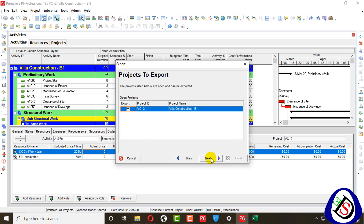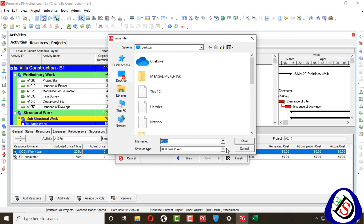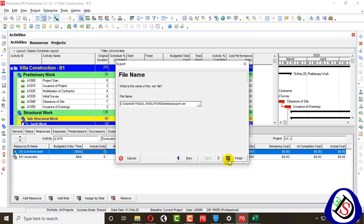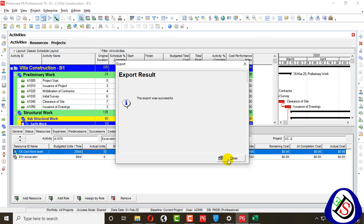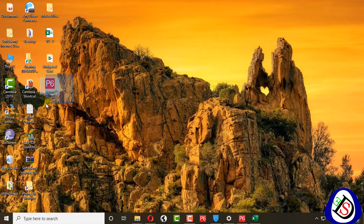I need to export the project, so I check the project box and the project ID shows which project to export. Clicking Next, I give the file location on the desktop and provide a file name, then click Finish. The export completes successfully. You can see the P6 latest icon on the desktop — note there's a spelling mistake in the filename but it is the export file.